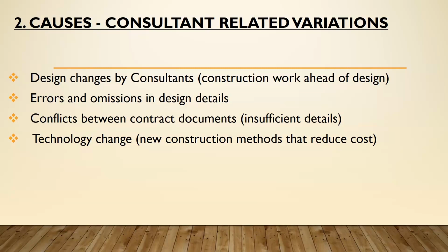So during execution of the project, there might be some changes in the design. And once this happens, there will be a need for a variation order to be issued, where the consultant realizes that there are some errors and omissions in the design details. I remember a particular project where there was an error in the design of the piers of a flyover.